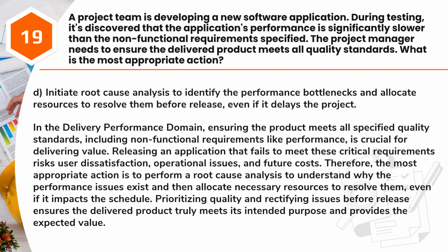Answer: D. Initiate root cause analysis to identify the performance bottlenecks and allocate resources to resolve them before release, even if it delays the project. In the delivery performance domain, ensuring the product meets all specified quality standards, including non-functional requirements like performance, is crucial for delivering value. Releasing an application that fails to meet these critical requirements risks user dissatisfaction, operational issues, and future costs. Therefore, the most appropriate action is to perform a root cause analysis to understand why the performance issues exist and then allocate necessary resources to resolve them, even if it impacts the schedule.